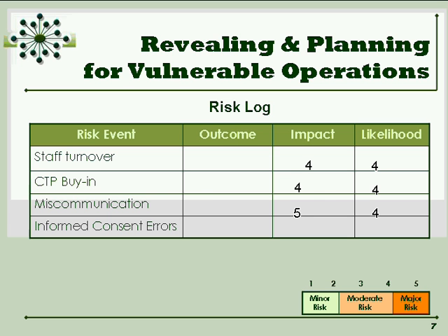Now, the interesting part of this story is when we found out what the contingency plan was for Quintiles, which is the central lab in CTN 27 based in Georgia. Their contingency plan for mechanical failure was to use their sister lab, which is fine, except that sister lab is located in Scotland. As you can imagine, that didn't work for us from a time perspective. It would take way too much time to get our labs to Scotland, and results back to us.